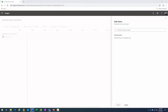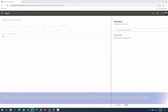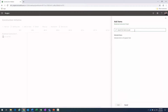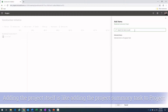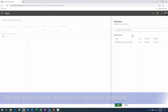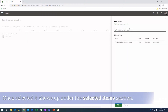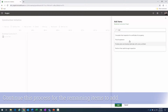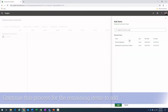The system is now prompting me to add items to my row in the roadmap. I need to decide what items to add. I typically like to add the project itself first — that gives me a Gantt bar representing the entire duration of the project, like a level-zero project summary task. I'll type in 'Residential Construction Project,' click on it, and it automatically adds it to the list.